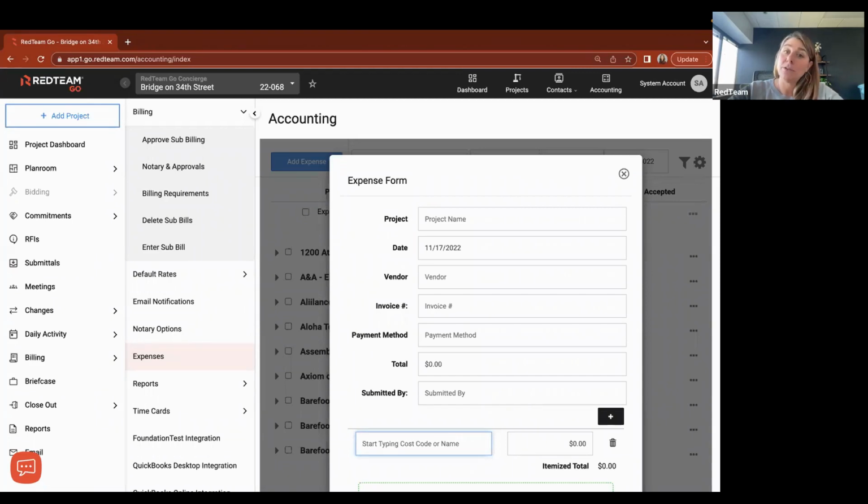The easiest way to do that is still to have a subcontract and then just to issue them a change order for the time and materials that they're giving you a quote for. You do have the ability to sign a $0 contract, and then you would just be change ordering in the time and materials. But I wouldn't do it without a contract, even though they're on a time and materials basis. But that would basically be how we would do that.